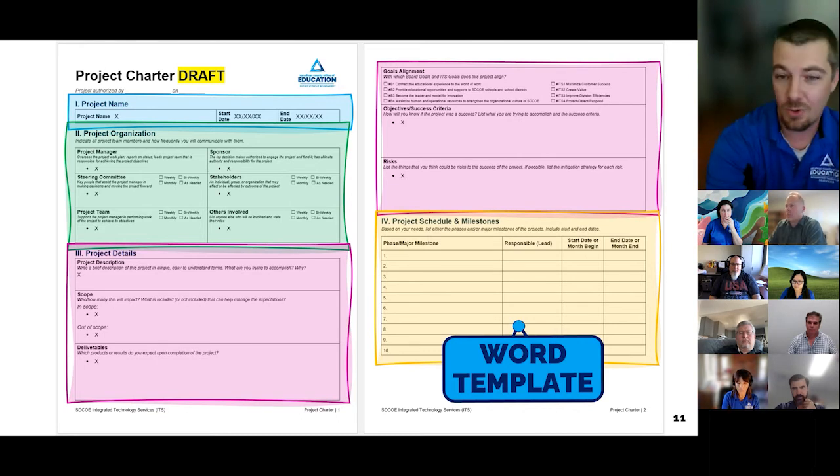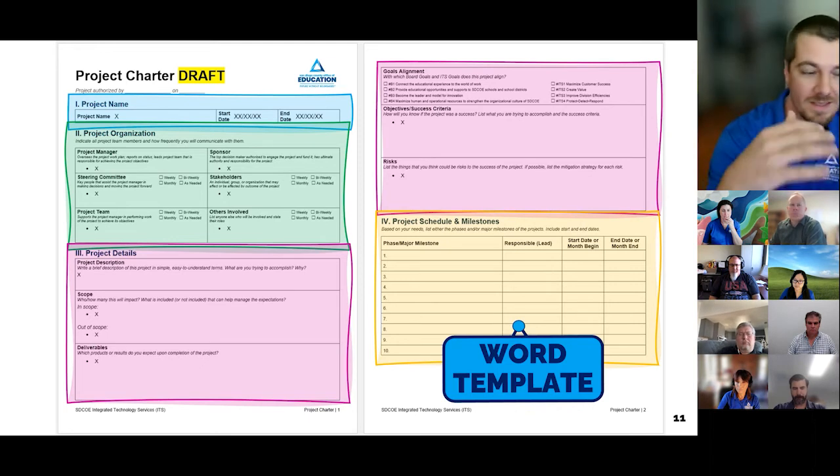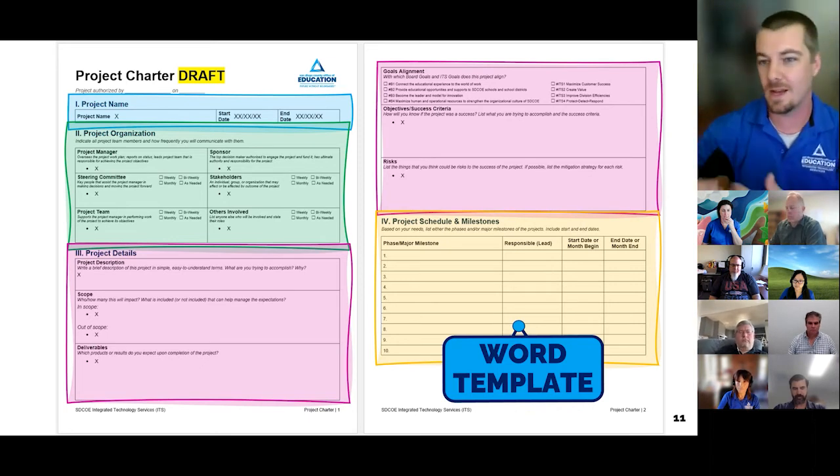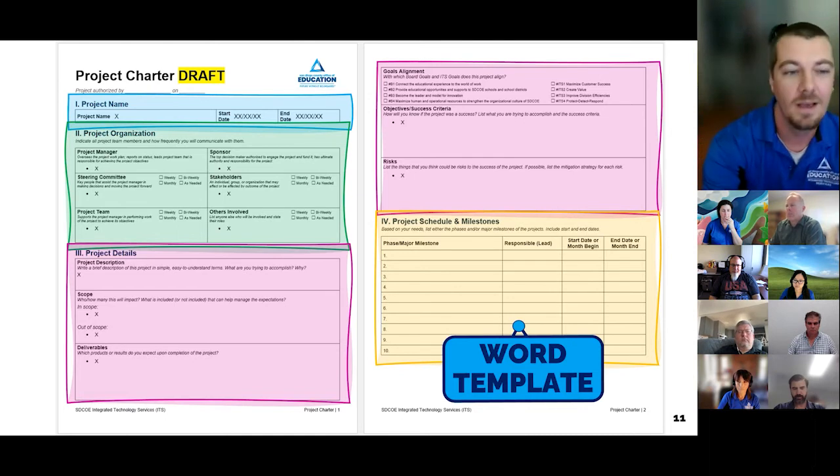And if possible, break down who's going to be responsible for it, when the milestone work starts, and when it's expected to end. Really, the point is to prevent you from 6 months down the line being like, oh, shoot, I forgot to think about that. Now we've got to slide the whole project schedule back 3 months. You want to avoid that by doing that planning here.